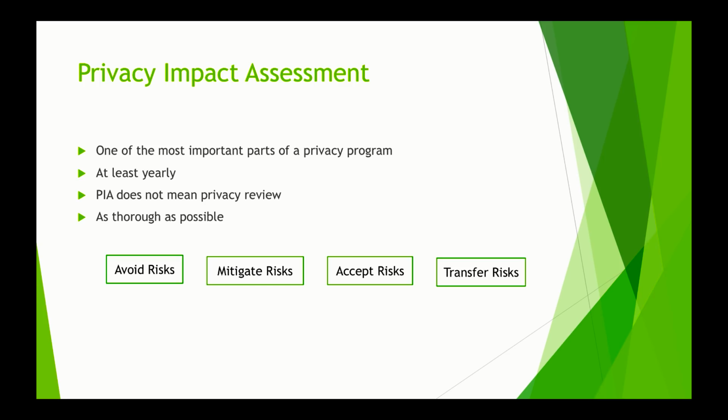In a small organization, the privacy team can perform the risk assessment. In large organizations, the risk assessment responsibilities may have to be spread out across teams. Using the assistance of an external party can help to streamline the process. Risks can be addressed in several ways: avoid, mitigate, accept, or transfer.